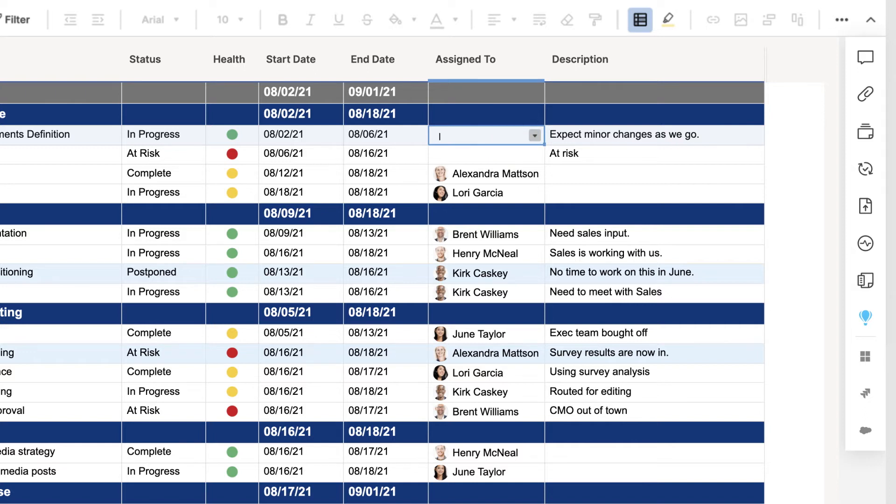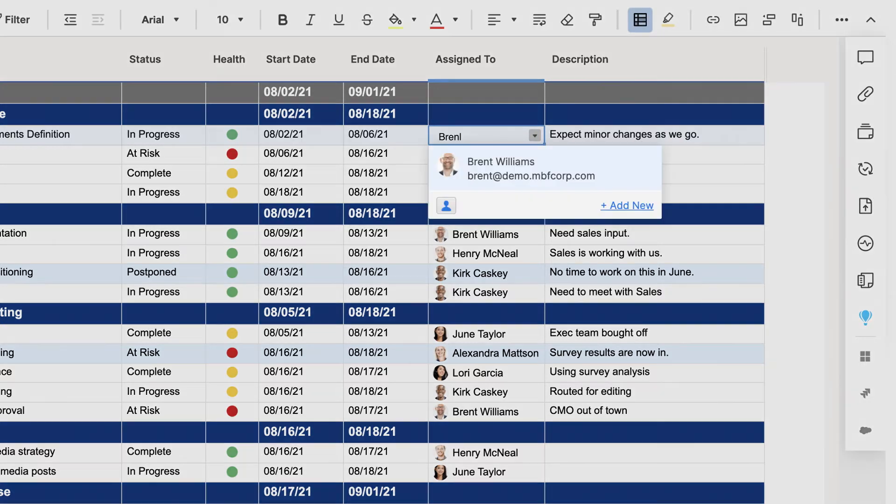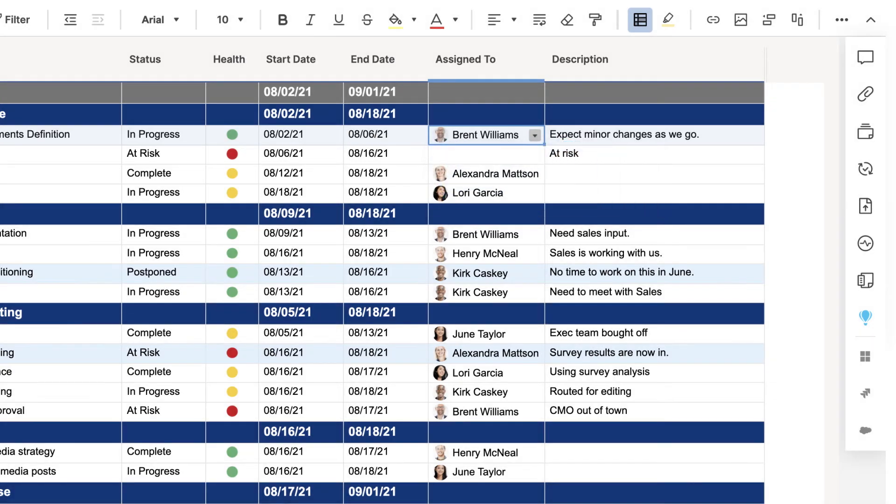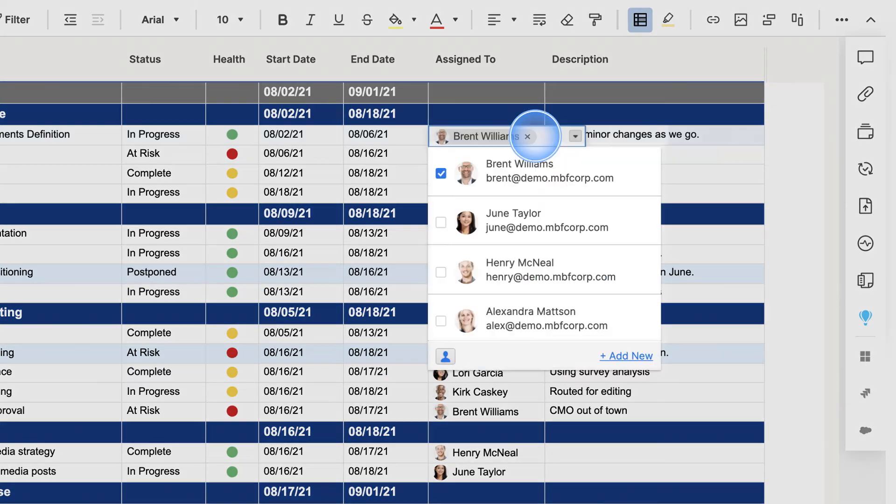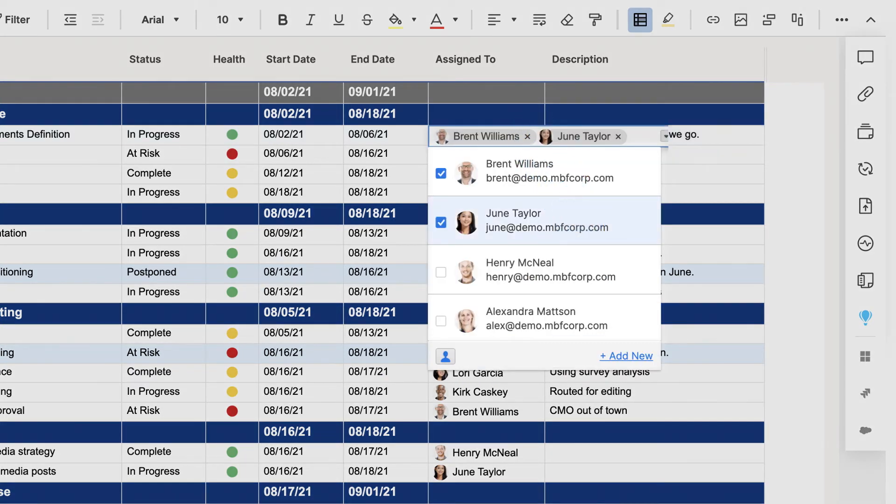To assign a row, start typing an email address or name in the cell. If you've already assigned a task or shared your sheet, Smartsheet will display a list of potential matches. You can assign multiple contacts to any given task.